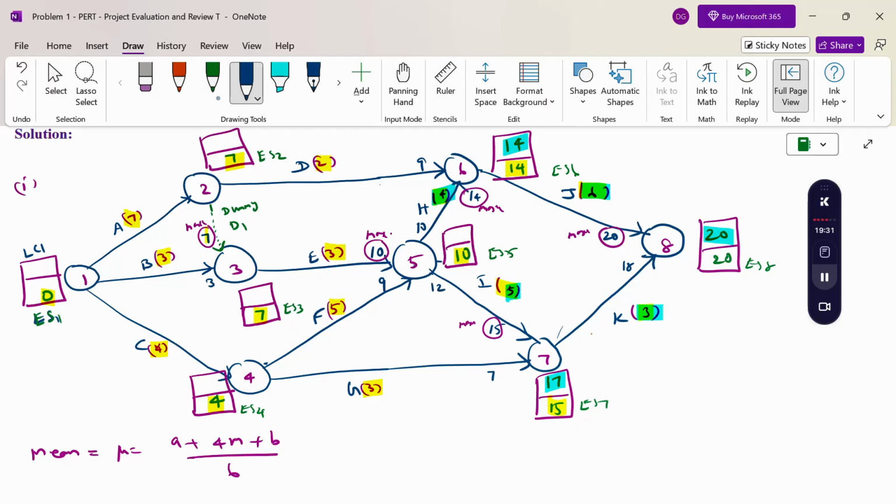From these we choose the minimum, so the minimum value is 10. And then the fourth one also has 2 lines going. So this line, 17 minus 3 is 14, and this line, 10 minus 5 is 5. The minimum value 5, therefore this term is 5.